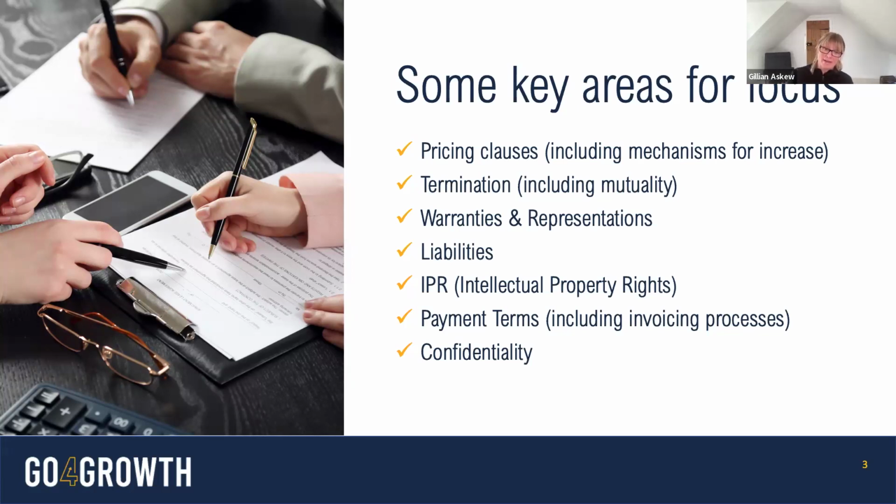You might have liquidated damages, unliquidated damages, unlimited liabilities. There should be less and less unlimited liability in contracts now, because it can often be a real barrier to entry. But you need to think about what those liabilities look like and what they might mean to you if they were ever at play, and how you might indemnify yourself against them, how you insure yourself against it.